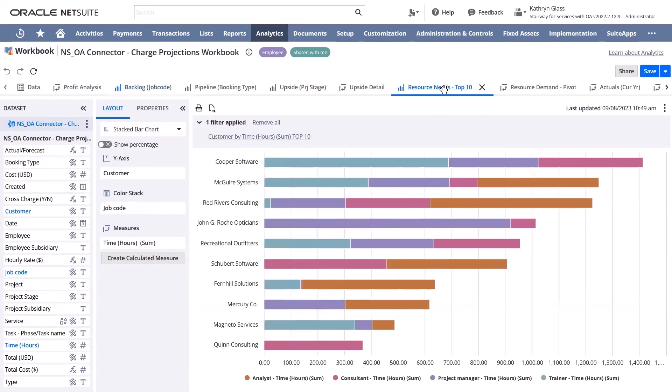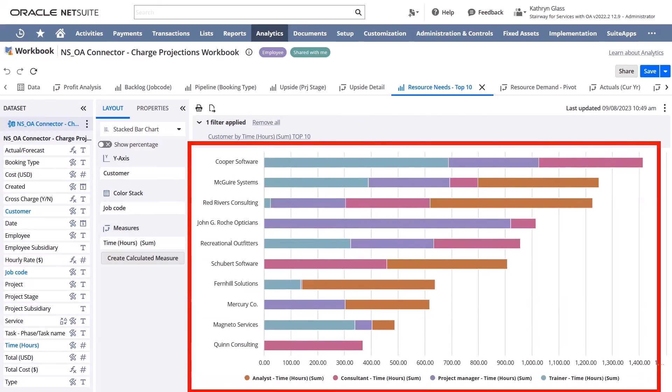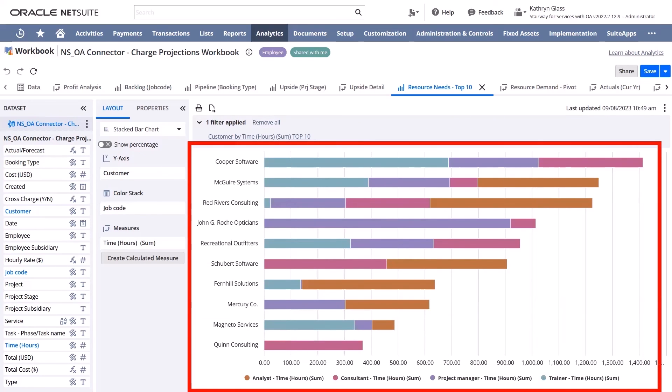We can see similar information within the Resource Needs tab. This helps the sales team understand the current demand and if their open opportunities can be staffed and what the potential start date might be for those engagements.